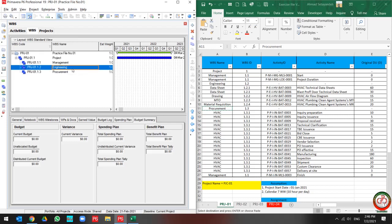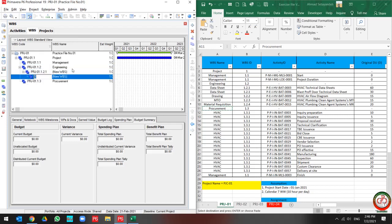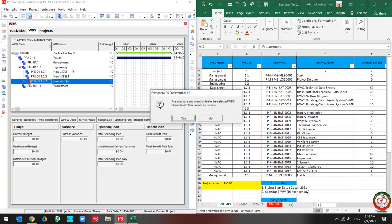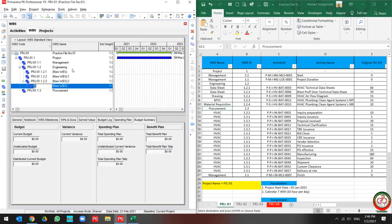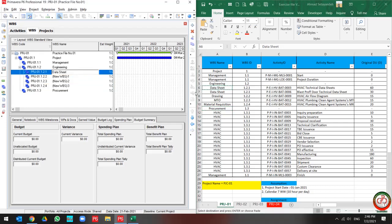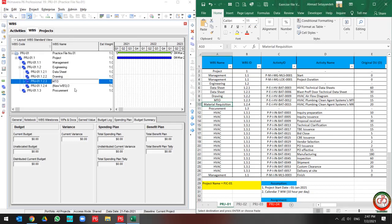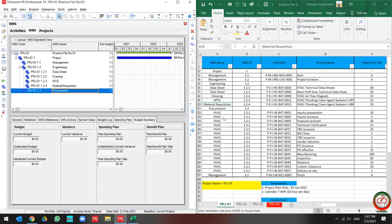I do the copy and paste for each phase. Then I create the Engineering categories: Data Sheet, Drawing, MTOs, Material Requisition, Procurement, and 2AC.